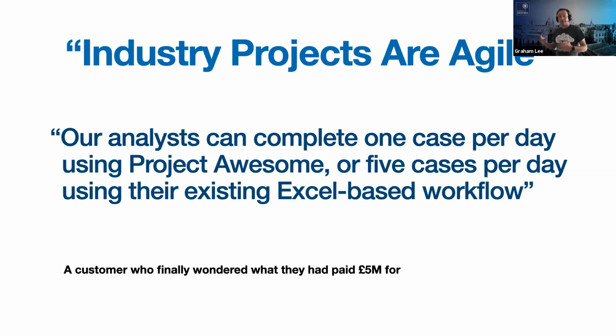So we were doing everything right in this particular company. We were engaging with our customer on a frequent basis. We were making sure that they were in charge of defining acceptance criteria for the work. We were encoding those acceptance criteria in automated tests, and then we were developing to those tests so that we knew when we delivered the next iteration of the software in 2 weeks' time, it did what the customer wanted.